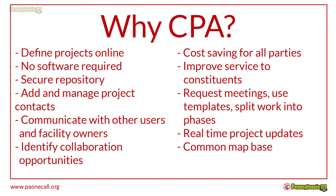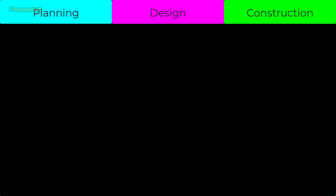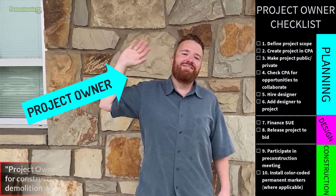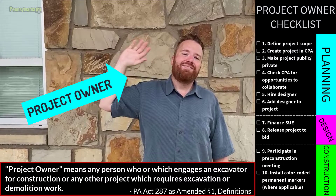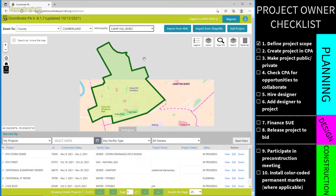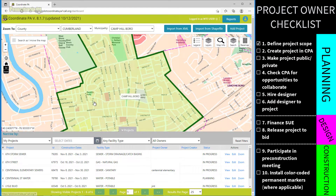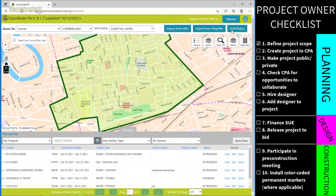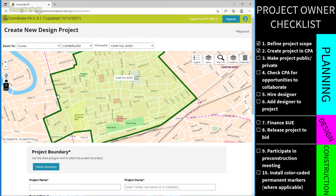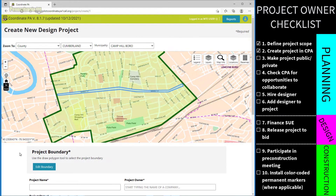Let's begin with planning. Our first stakeholder is the project owner — any person who engages in excavation or construction or any other project which requires excavation or demolition work. The first step is to define the project scope. Once the location of work is known, the entire scope is entered into Coordinate PA, which serves as a central hub for information, communication, and ticket placement for the four affected stakeholder groups: the project owner, the designer, the excavator, and the local underground facility owners.